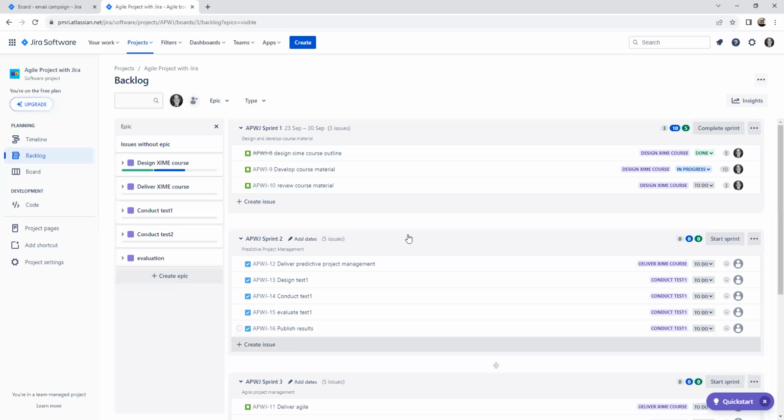Here I created all as stories. The first story is design XIME course outline, and it is under the epic design XIME course. The status is done, and I've given a story point of 5 for this, and this is assigned to me.